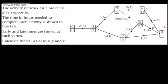What we're now going to do is look at a back pass and find the lowest value, which gives us the late event time. We work backwards. The early event time X becomes the late event time Z, so Z is also sixteen. Working backwards to find Y, we want this value to be as small as possible. Going back via H: twelve minus one is eleven. Going the other way gives twelve. We take the lowest, so Y equals eleven. That is the late event time.